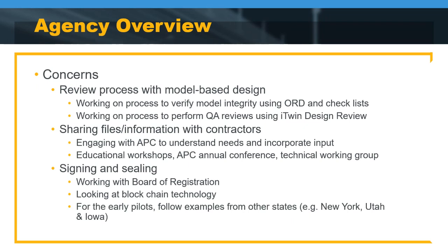But initially, to get through our pilots, we are going to fall back on the examples that other DOTs have utilized at this point, where you're signing and sealing basically a list of the project files with the time and date stamps for that model as the legal document. So until we get to any other advanced technology, we will be able to fall back on that. That has been presented to our board, and they have been receptive, and it meets all of the requirements for signing and sealing our files.